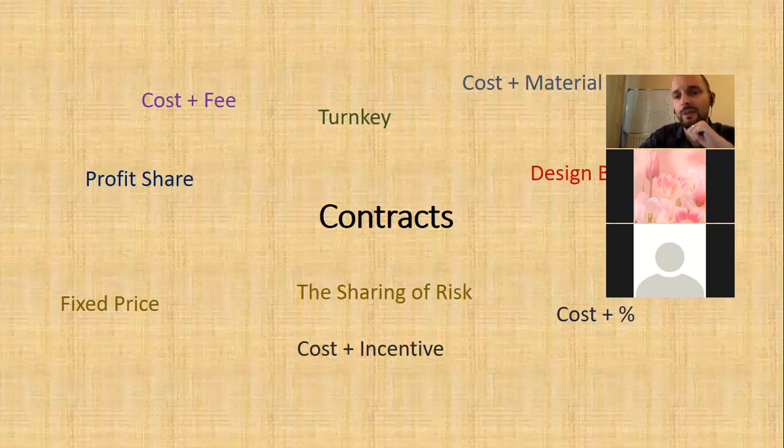So if a cost plus incentive, sorry, let's go with cost plus incentive for now. What would the incentive be, Ivan, that I would be offering? Sir, for example, if you say, I will pay you an extra, let's say, $1,000 or $5,000 if you can keep the total cost down to $10,000. Yeah, exactly. This is for a cost risk.